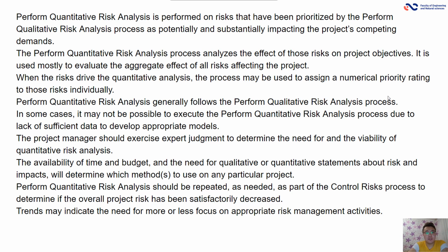Perform quantitative risk analysis is performed on risks that have been prioritized by the perform qualitative risk analysis process as potentially and substantially impacting the project's competing demands.